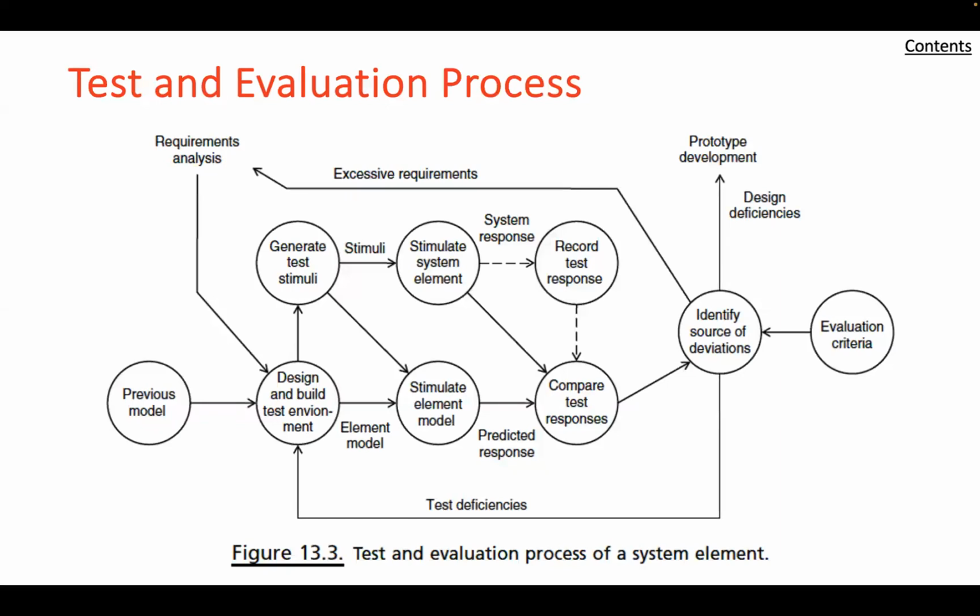Next, you want to be thinking about the creation of the test environment. The design and construction of the test environment to validate a major component or subsystem requires equipment for the realistic generation of all the input functions and the measurement of the resulting outputs. It also requires the prediction and generation of a set of outputs representing what the system element should produce if it operates according to its requirements.